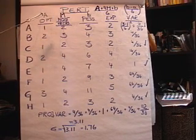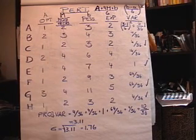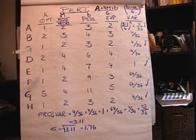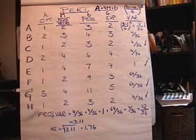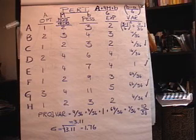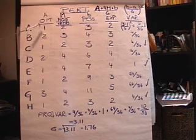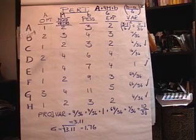As I stated in the first video, PERT was the technique for the stochastic times on the project, on the activity times. It's where there's uncertainty in terms of the activity times. So let's say we've got the same project as before with activities A through H. And we ask the people doing the work on these activities what the optimistic time for the project is, the most probable time, and the pessimistic time for each activity.